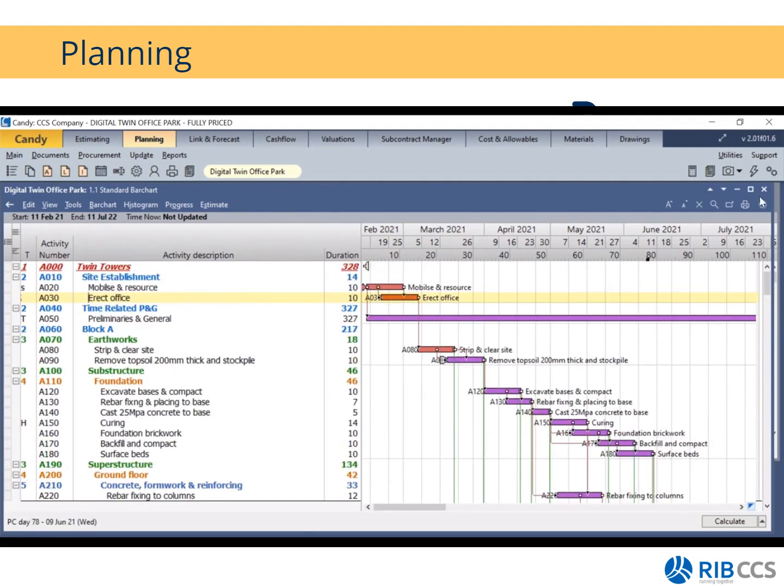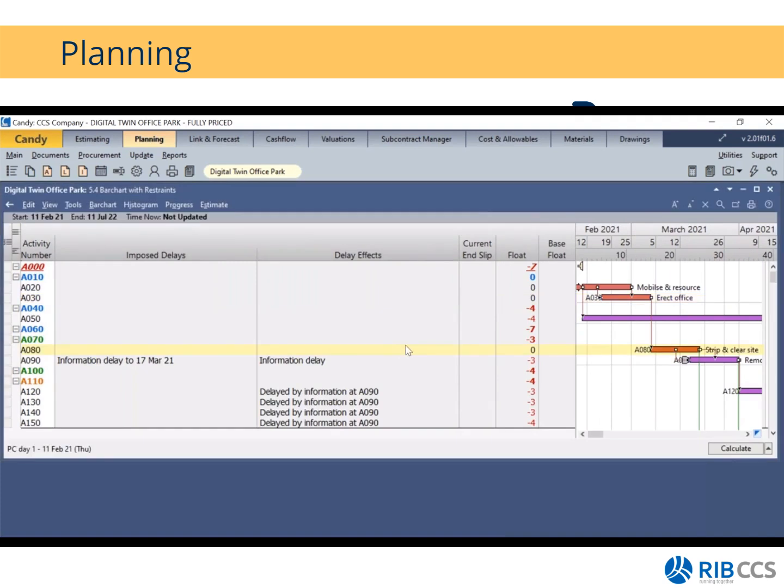All right. So to clear this out, you can either leave it like this or submit it to the client and say, hey, if I don't get an answer by a specific date, this is the effect it's going to have on the program. And then they will probably refer you to someone else to assist.